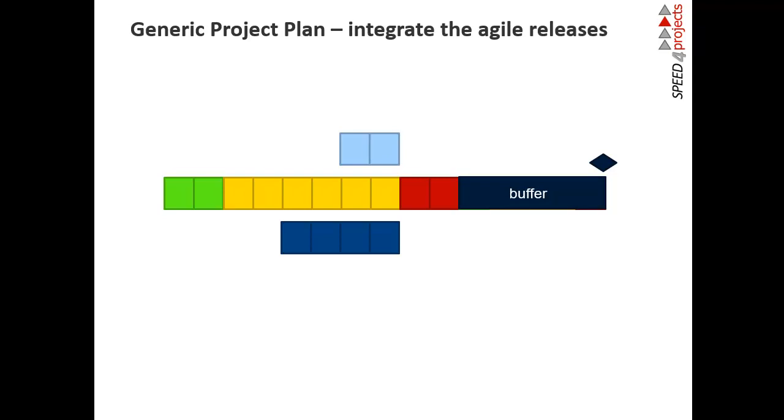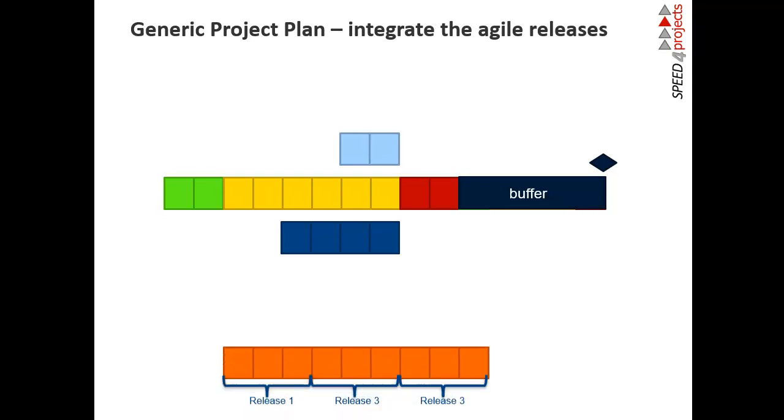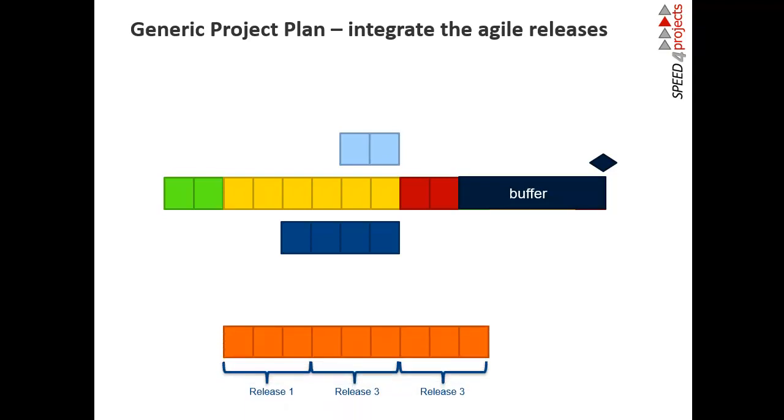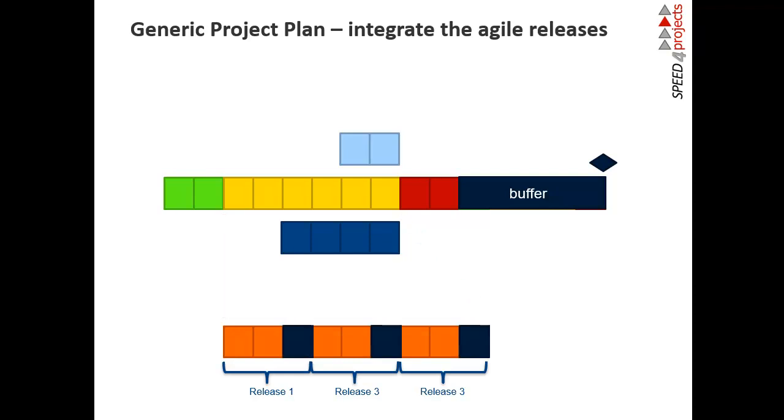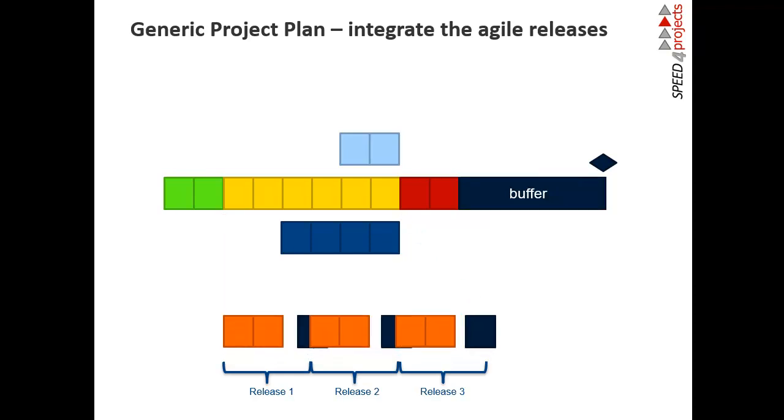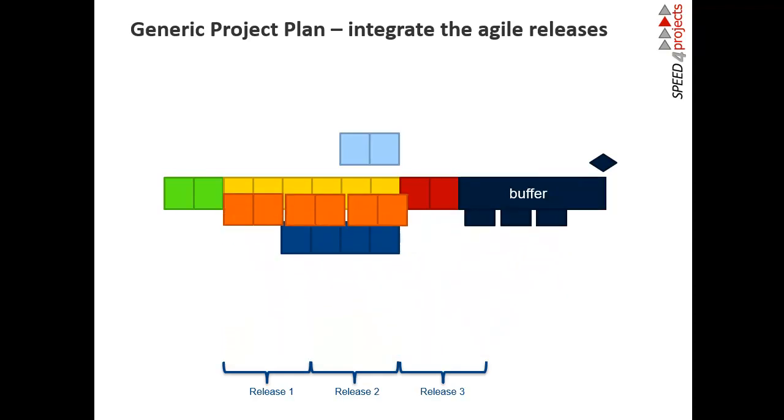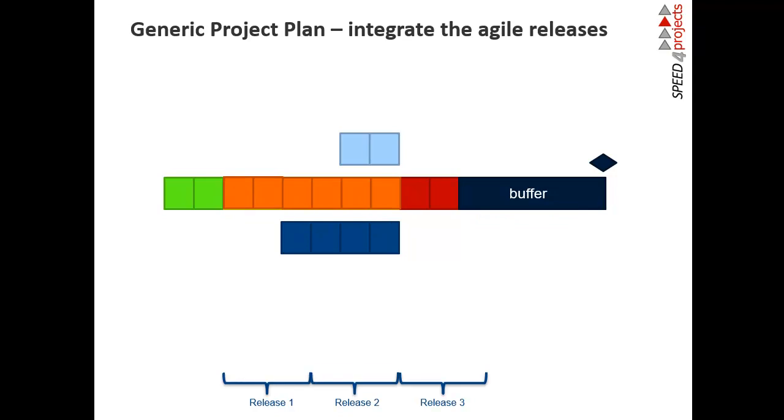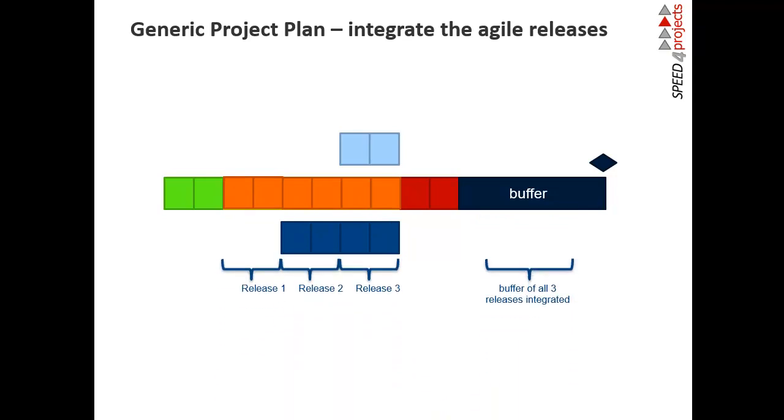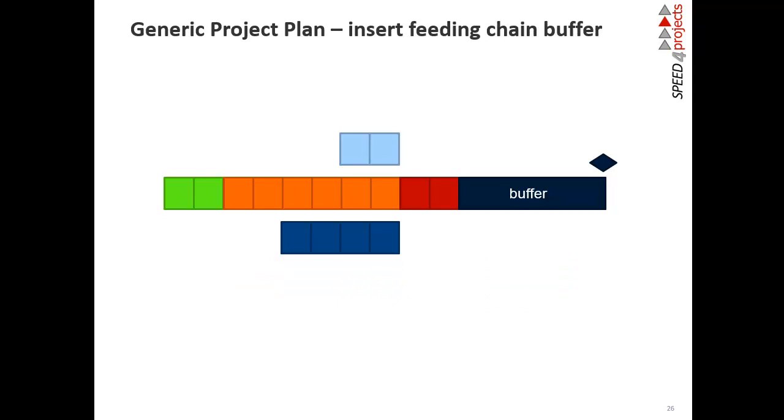Sometimes you have an agile path in it, mainly the main path, and it has some releases. You can do the releases or sprints exactly like Critical Chain, and then you have some buffers in it. You can do it exactly like in normal plan: two-thirds goes into the critical chain and one-third goes into the buffer. This is now the buffered view.